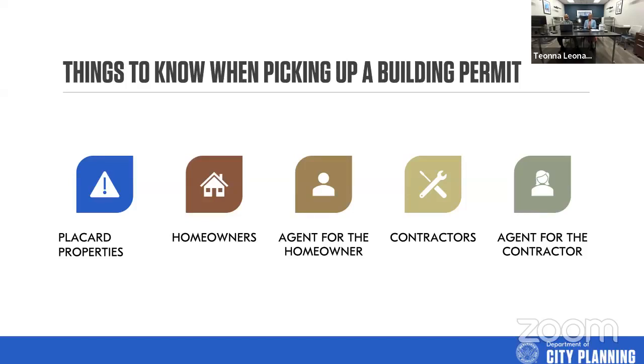Of course, a contractor can always pull a permit for the homeowner, and in my opinion, it's suggested. When you pull a permit as a homeowner, you take on all of the liability and responsibility of the subcontractors that you hire to do the work. Whereas if you have the contractors pull the permits, their licenses are subject to whatever.